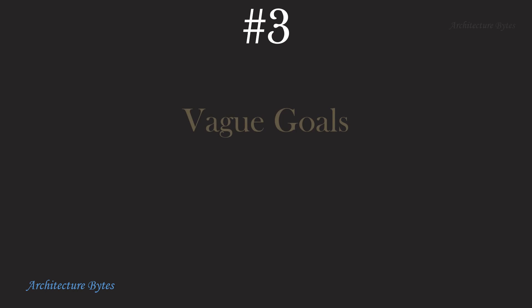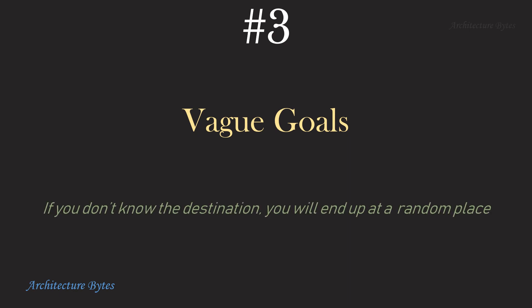At number 3: vague goals. Many projects start with a vague idea of what they want to achieve. For example, "we would like to build a data warehouse that should take any input and produce any output." This is not a goal, just a vague desire. Its final outcome will be vague too. In other words, if you don't know the destination, you will end up at a random place.